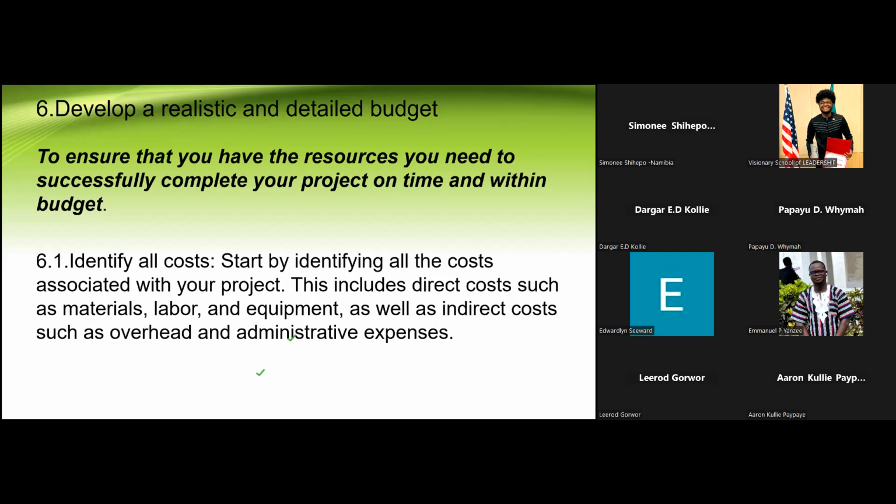And then you've now identified all the costs associated with the project. And then you make sure that you have all the direct costs as well. Don't forget about the materials and the labor. And sometimes people forget, even they say transport and they budget for fuel, but they don't budget for cab money or taxi money. They don't budget for transport within workshops. So it's a tedious process, and that is why it needs all the brains around the table. Sometimes with budgeting, we do 5-day workshops. And at the end of the 5 days, we have a draft for your information, not even the full budget.